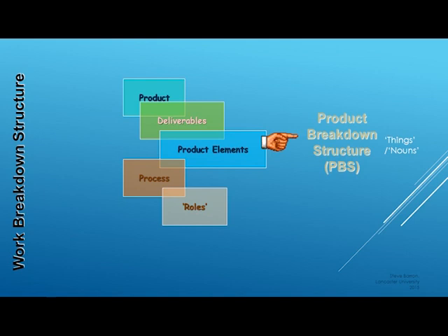Involving people who know about how to do this work will help to identify activities. There is a strong correlation between who is doing the work and what work is selected to be done. Different people have different working methods. There needs to be some flexibility between the work defined by experts and/or designers of the work process and those who will ultimately complete the work. Therefore, we must be careful about the level of detail we include in the activity definition.